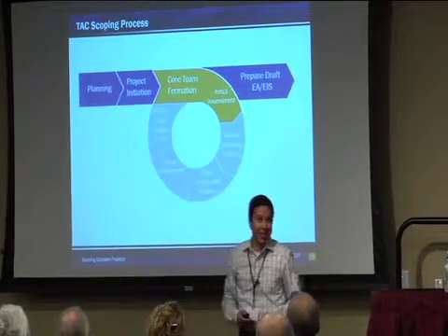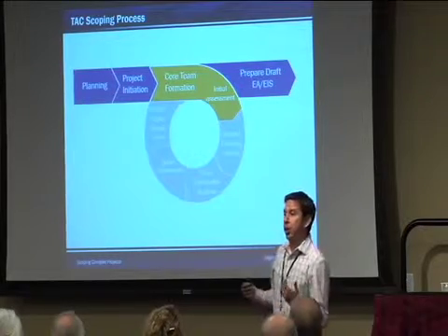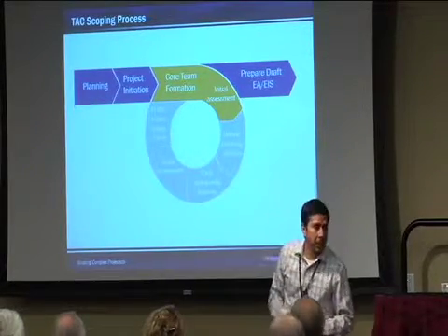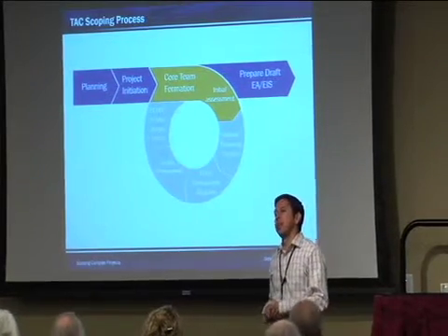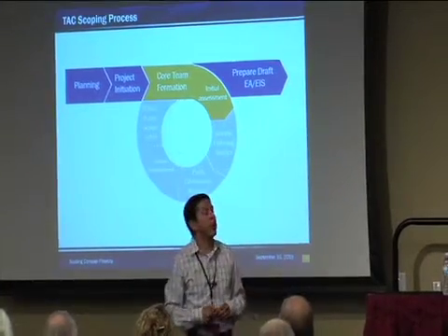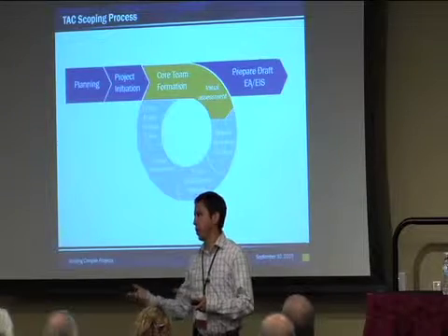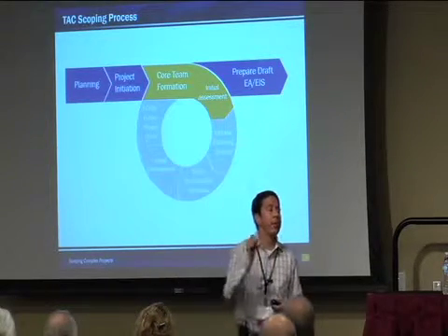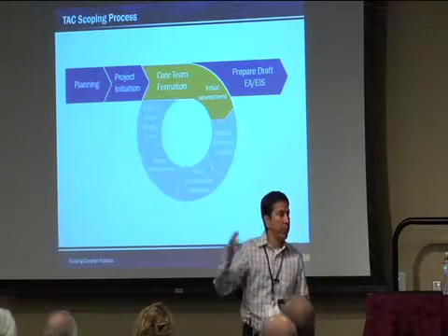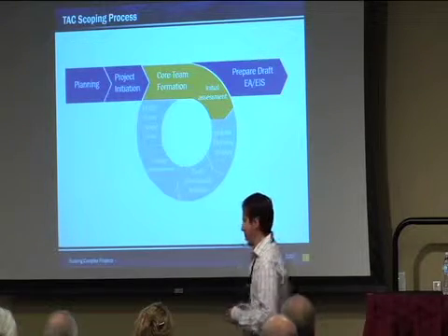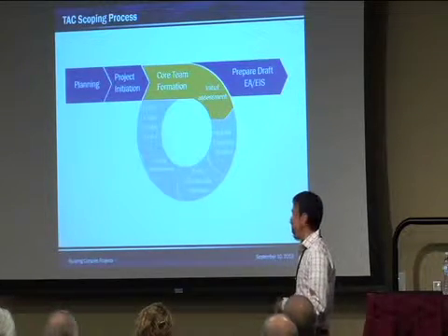Review, planning, studies. We look at some of the early studies that have been done by the planning department as a way of identifying some of those initial constraints and seeing what we can take from those. It's getting back to some of the FHWA initiatives on planning and environmental linkages, bringing in some of that early work and seeing how it can shorten our time frame. Then we do an early constraints analysis.